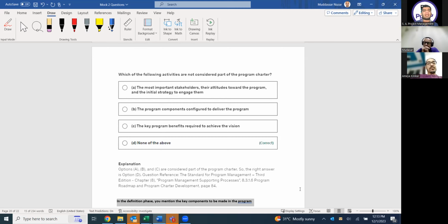And another hint here is that in the roadmap, I have the milestones. What are the milestones? They tell me when I will get this benefit, and this benefit. So that benefits delivery is for every component. Remember when we covered benefits, every component has to deliver its own benefits that will be integrated to give me the program benefit. So it means in the program roadmap, I already know at which moment I will get what benefits. So the overall concept, structure, and picture of components are already there in the program definition phase, which means business case, charter, or roadmap. Okay, but the components will be initiated and closed within the program delivery phase.